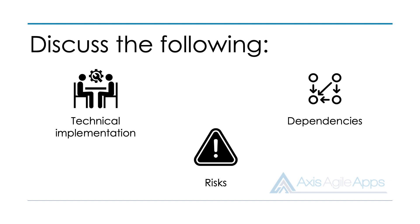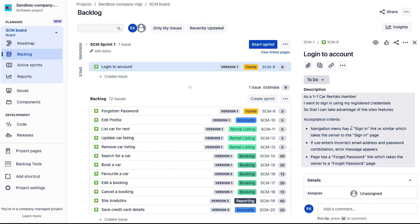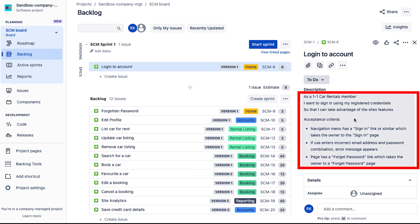Thirdly, discuss any risks — things to look out for. It may be that the team is working with a new technology and might get it wrong, or that somebody is away that sprint who would typically support the team, creating a level of risk. If you think about those risks in advance, you're more likely to achieve a successful plan. You can capture this information on the product backlog item in the description, in the comments section, or even as attachments in JIRA.